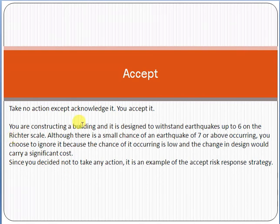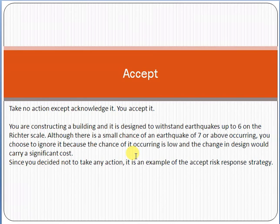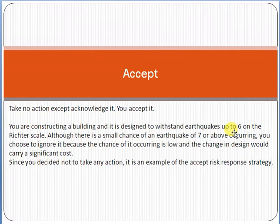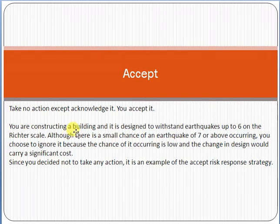Accept means you take no action — you acknowledge and accept the risk. For example, if you are constructing a building and you know the structure can bear an earthquake up to scale six, but an earthquake greater than scale six could cause an issue — and no earthquake above scale six has occurred in that area until now — you accept that risk. Acceptance means you acknowledge that if such a situation arises, you will deal with it accordingly.